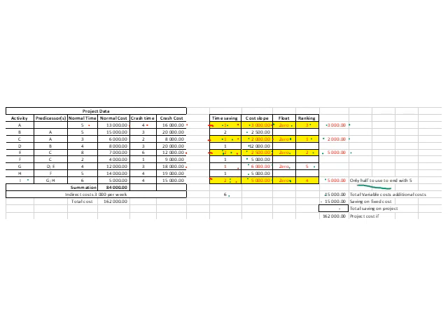You will see only half used, that's why it's there. And our cost saving is 5 times our 3 weeks here. So we have a saving of 15,000, and we have an addition of 15,000, and thus we have a cost implication of 0, and thus our project cost stays at 162,000.